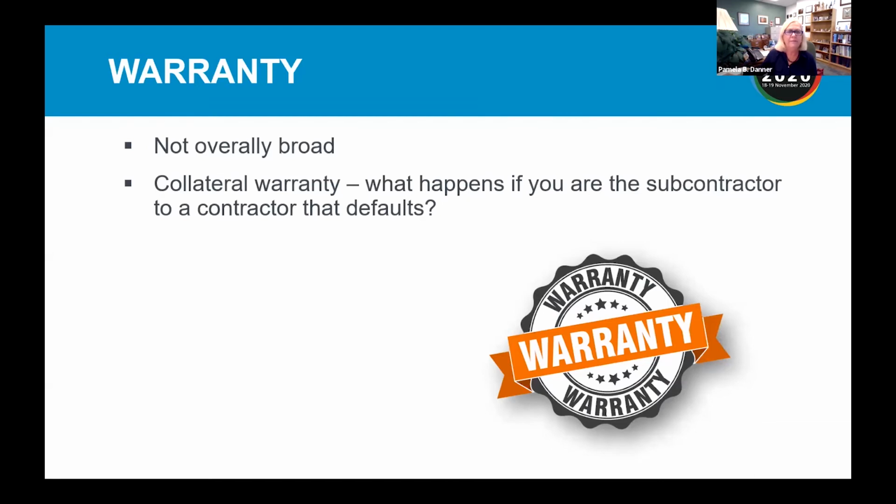Warranty. Now, this may be stated in other ways, but it's usually included in some manner in every contract. It should not be overly broad. Watch out how it is worded. For example, this would be an okay wording: the consultant shall endeavor to perform services in character, sequence, and timing to conform to the project schedule as provided to and accepted by the consultant, you, at the time of the signing of this agreement.